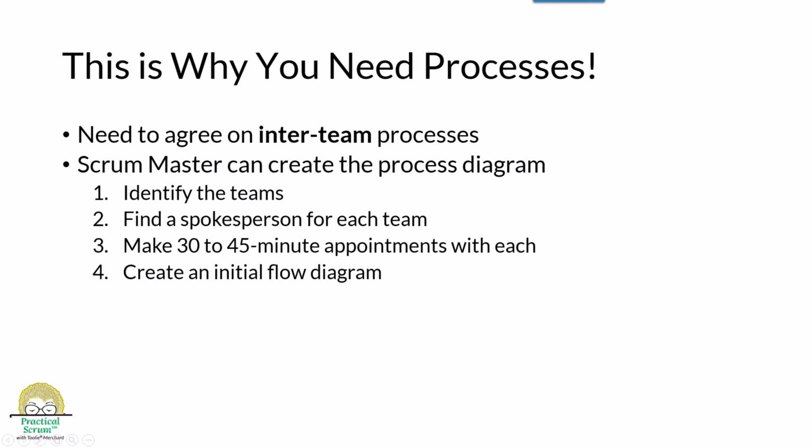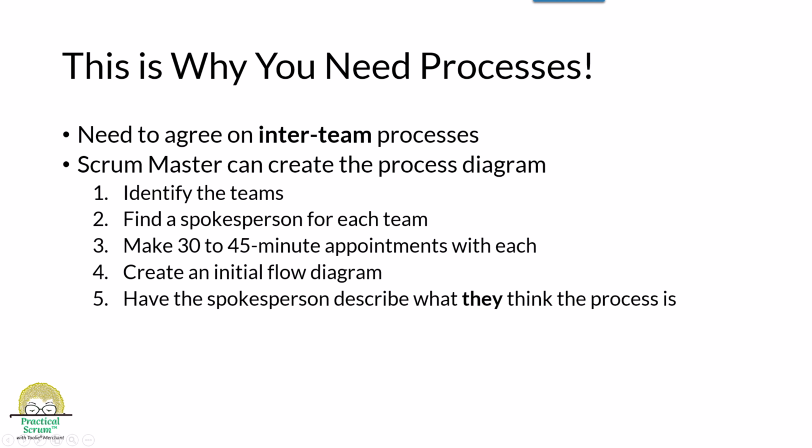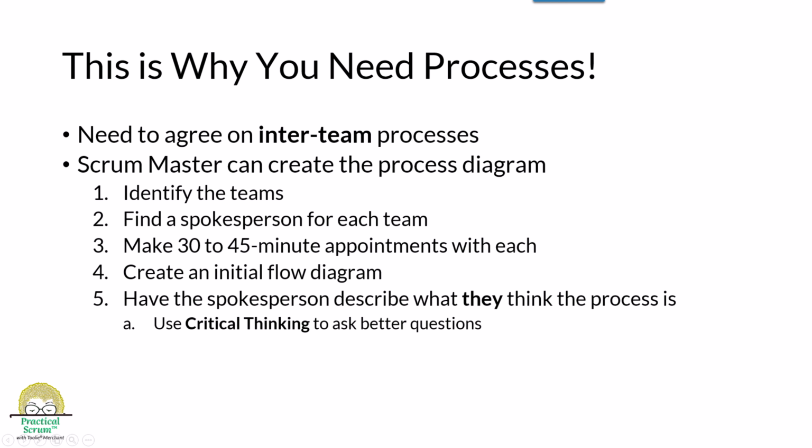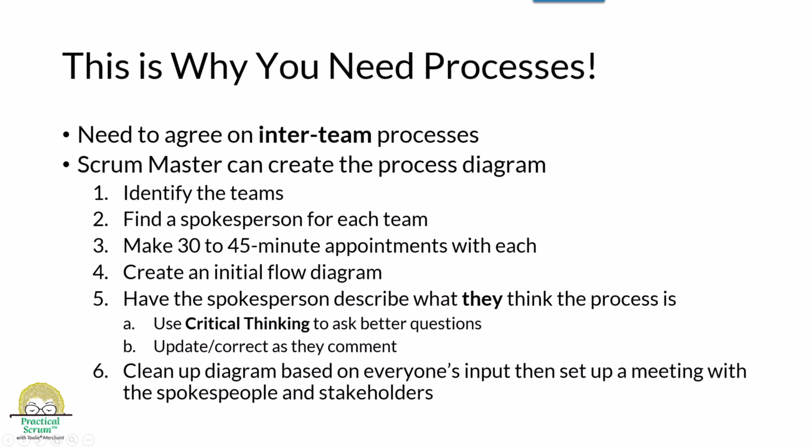Number 4, create a high-level initial diagram of what you understand to be the flow of the work between the teams in Miro or some other whiteboarding application. Number 5, in each appointment, have them describe what they think the workflow is. Use shapes and sticky notes to annotate and/or correct your diagram. Number 6, clean up the diagram and then set up a meeting with all the spokespeople and any other applicable stakeholders to get last-minute corrections and the buy-in on the final diagram.